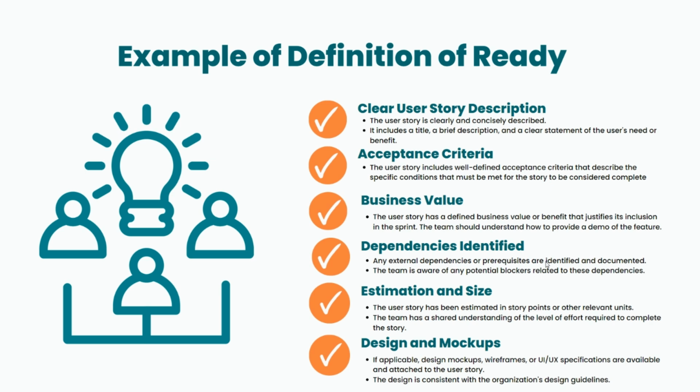So those things can be checked at the time of grooming, because design is a very important part. If we miss the design, if we go for a wrong design which is not in alignment with the organization, then after you complete the outcome, or you go for review and you get the feedback, you are supposed to do the rework. And if you are supposed to do the rework, then there will be a lot of work again, and some misses to meet the sprint goal. So this is the example of definition of ready.